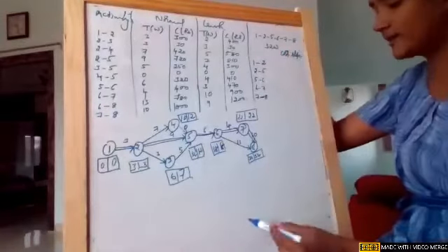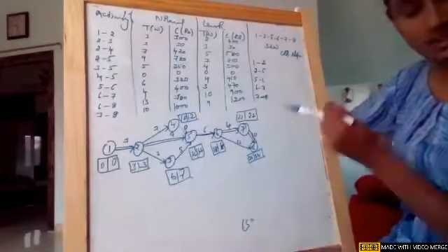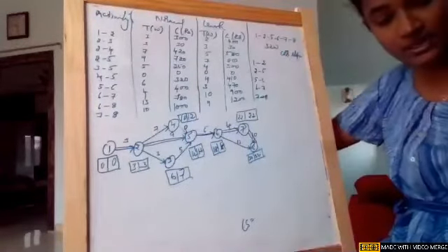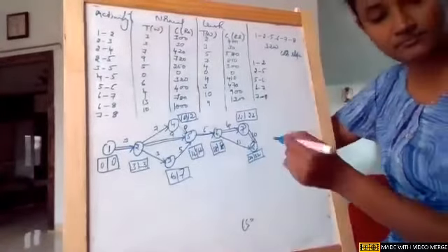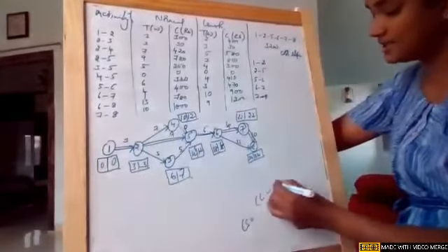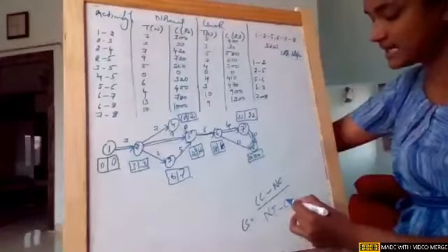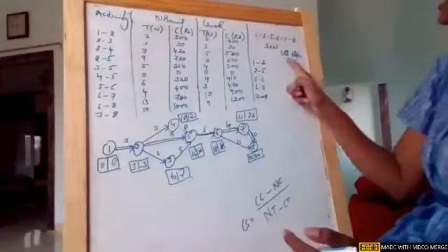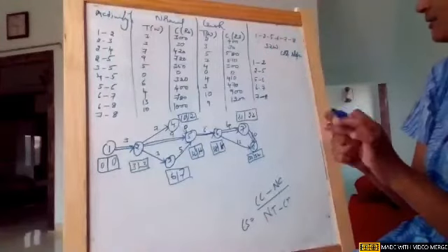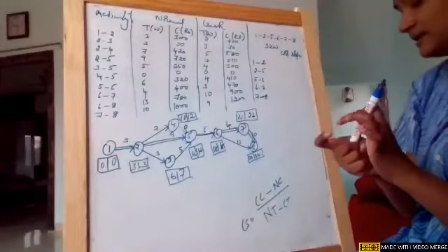So you remember, now I'll write the cost slope formula. The formula is crash cost minus normal cost divided by normal time minus crash time. Girls, to avoid space, I'll directly write the values. You can just see, I'll explain it while writing.